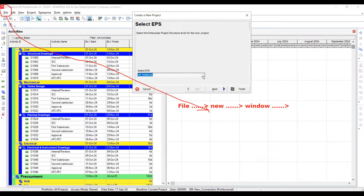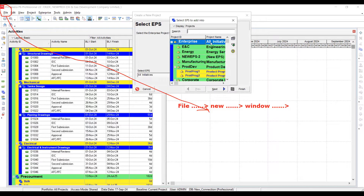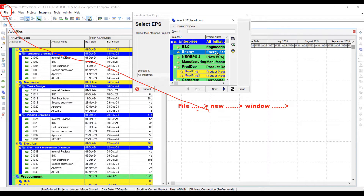I'm going to click on this three-dotted area. EPS actually means department — Primavera P6 is very versatile software and it allows us to save our project in different kinds of folders. We can make them in sequence. If I click on this three-dotted area, it is going to open up this kind of structure — like a hierarchy of folders.